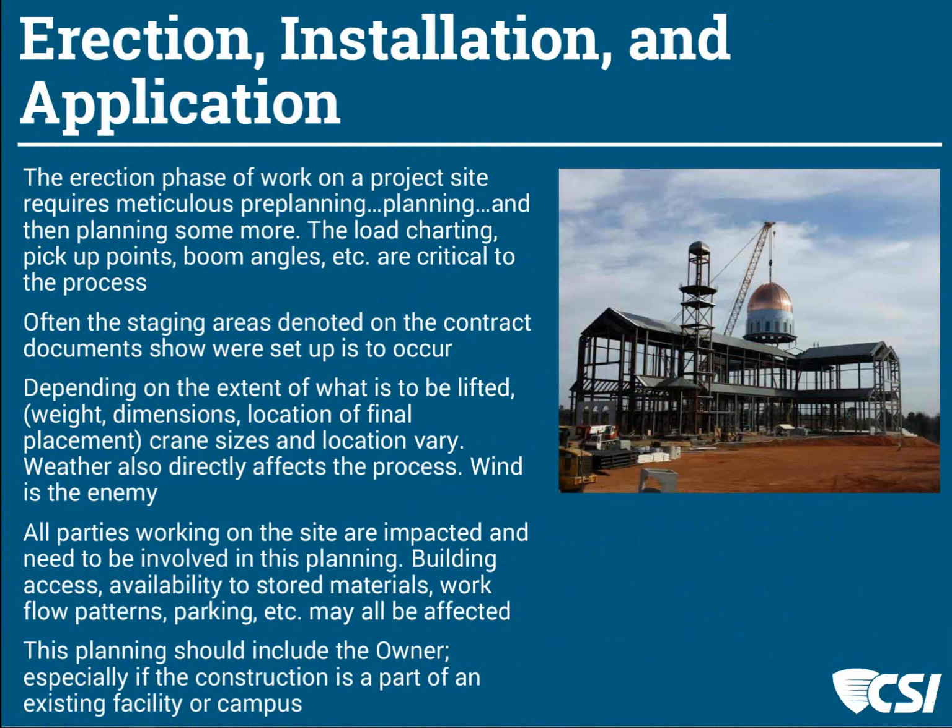And so I would guess there were probably 1,000 people out to watch this happen. It was a great marketing opportunity for the contractor, for the church, for many of the people in the community related to the project. And so sometimes the installation or the execution of the work can turn into other things. There was meticulous planning for this, to build a pad for the crane to sit on. So there was a lot of engineering, structural, and site work that went into how this dome was going to be lifted and placed. And all of that, again, was the general contractor's responsibility to arrange for.